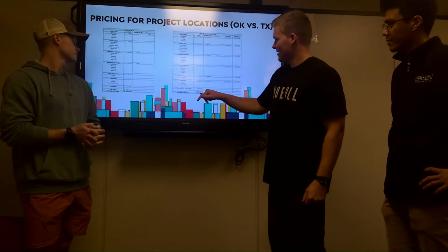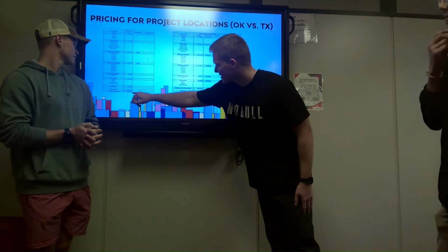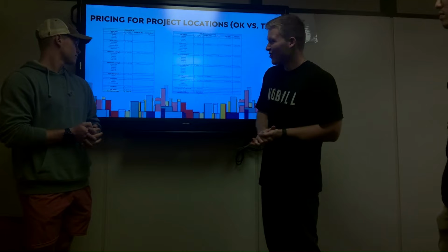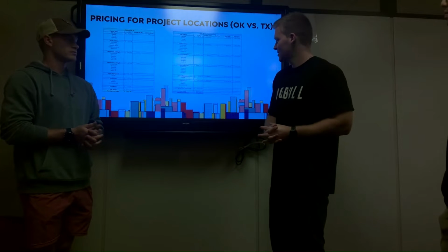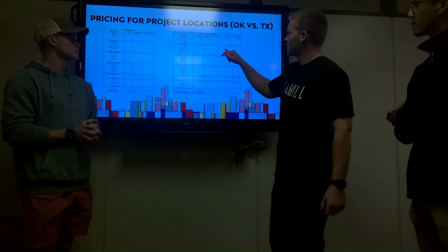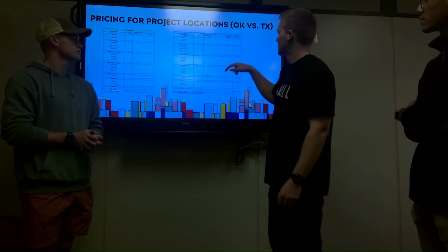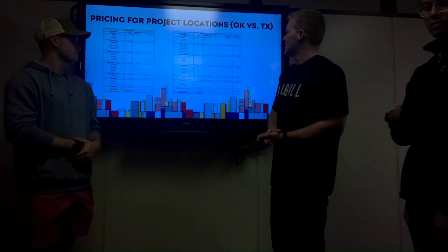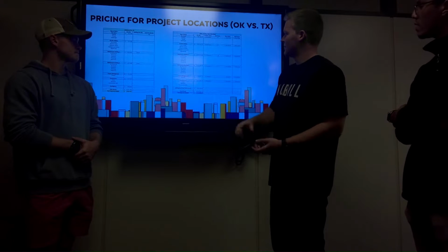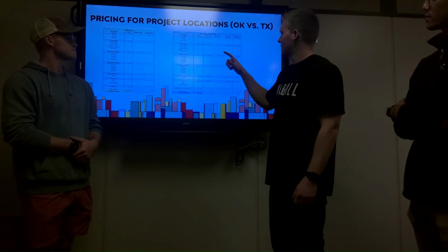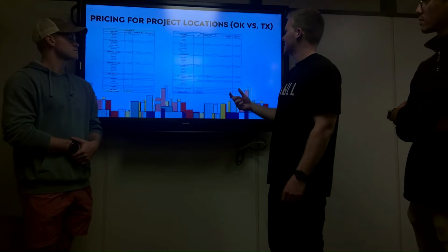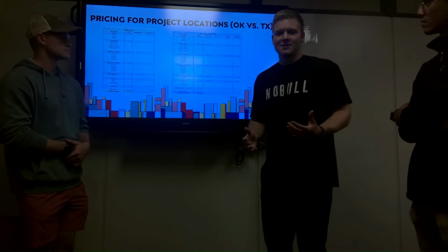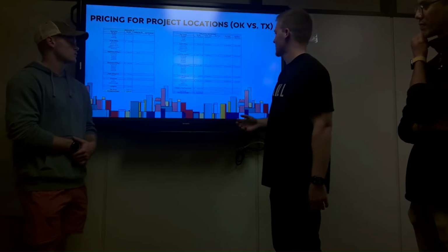And we have Oklahoma. It's really hard to read here, but I think it's $3.3 million was the total approved budget. If we were to build this 4 years from now in Dallas, using all the different factors for location, size, and time, we split it up into each little subgroup and multiplied each of the factors that were needed to get a total factor, and multiplied the factor by the price for Oklahoma City, and that gave us our Dallas pricing.